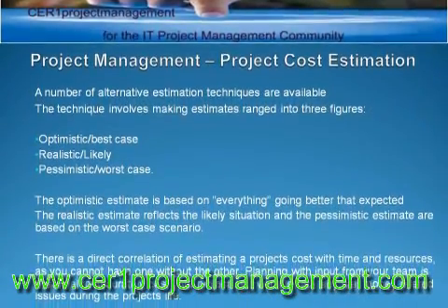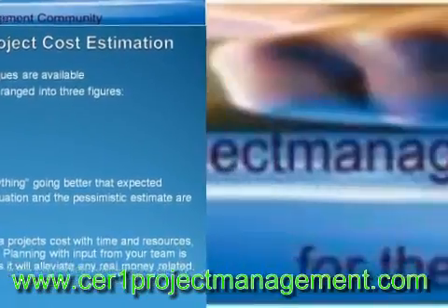Until the estimating history is available, four broad guidelines are suggested. The smaller and more specific the activities, the easier they are to estimate. The greater the risk of the project, the greater the possibility of estimating error.